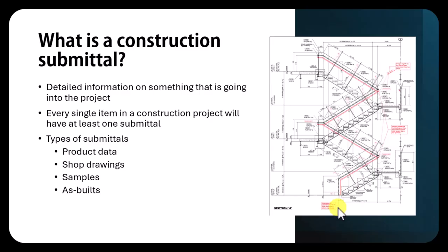Or it's going to tell you your wet utilities were supposed to go here. But as soon as we started digging, we encountered this and we didn't know this was there. So we went a foot lower to avoid it. Something like that. Your as-built are very important at the end of a project. It's called project closeout. And you're going to have to submit those as-built to whatever jurisdiction you are in. Or at least that's my experience. If you don't have to do that somewhere else, someone leave a comment because as-built are annoying. But they are very important because the city collects all of those and then uses them as a database for future projects.